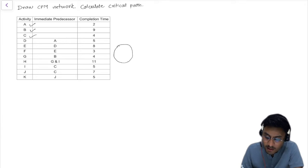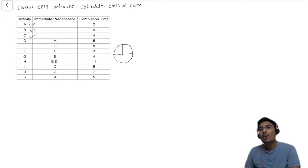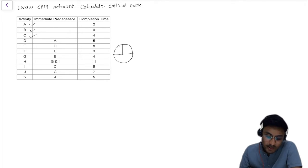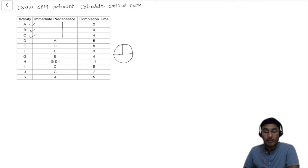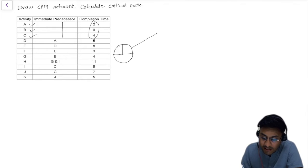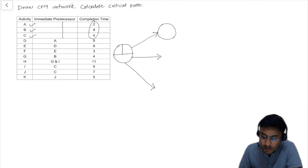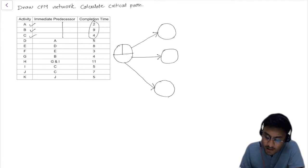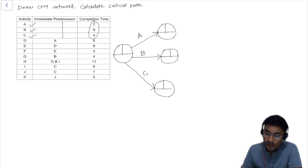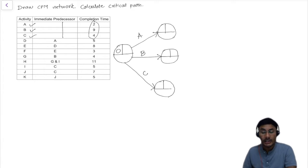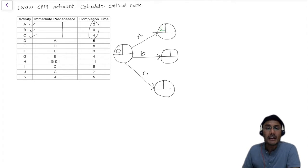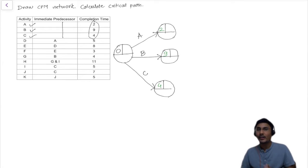First, draw a circle which will represent the earliest start, latest finish, and the float. I am drawing this diagram to get the calculations done at the same place. A, B, and C are the three tasks that don't have any predecessor but they have a completion time. Activity A has a completion time of 2, B has a completion time of 9, and C has a completion time of 4. All three activities have a start time of zero.